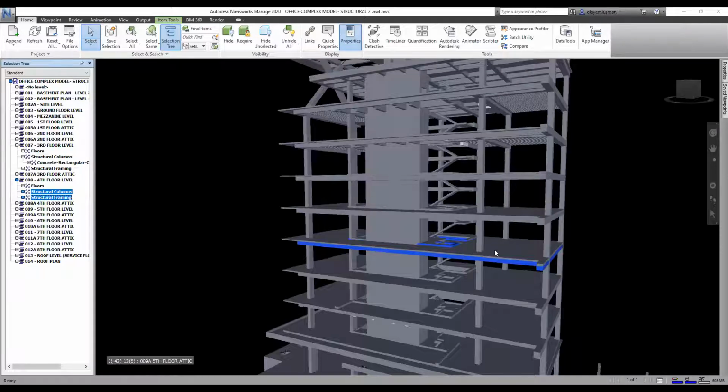Now, where I am is I'm talking about the breakdown of the framings, where we have 600 by 750, 450 by 1 meter beam. These are the breakdown of all my framings, and I can easily group them by sizes. But when we are doing our bill of quantity, we lump all of them together. But when we're talking about formwork, there's a need for us to understand how the construction methodology is going to be done. And I mentioned earlier that in the traditional way of doing quantities, we don't usually consider the intersections of beams and columns because it is negligible, which is okay according to rules. But when you're talking about digital construction, all these have been deducted and taken care of.